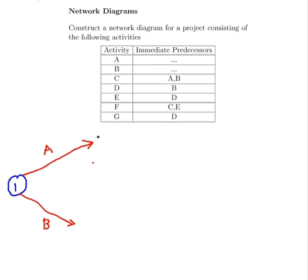Now let's put in some nodes here, 2 and 3. So the next activity is activity C and it depends on A and B. So what I'm going to do is have activity C pointing from node 2. So that's activity C.